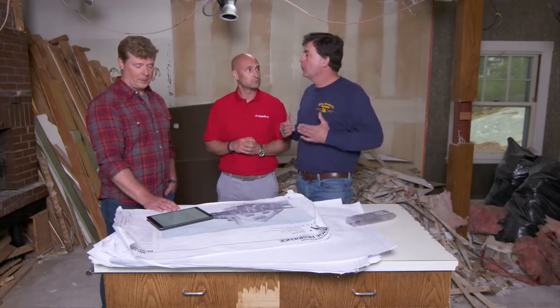And on that note, I run multiple jobs, right? Is this a nightmare for you, or do you just like insurance? It seems like all of a sudden you've got multiple jobs, a lot of subs, and all this equipment. How do you deal? It's not a nightmare, to answer your question, but as a homeowner listening to this, I can see it being overwhelming. If I have 3, 4, 5, 6, 8, 9 jobs running at different levels in dollars, and I have a $1 million policy, obviously that's not enough money. So I need to be covered per occurrence, right?